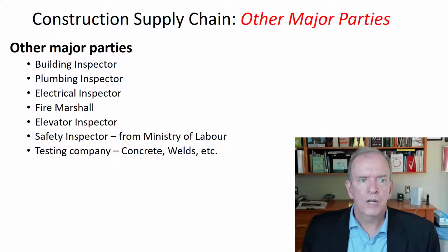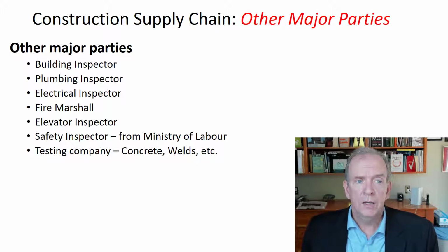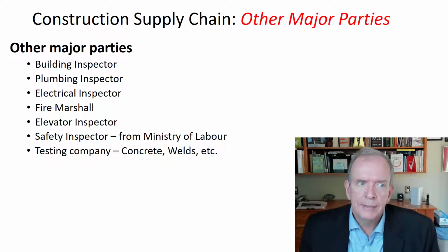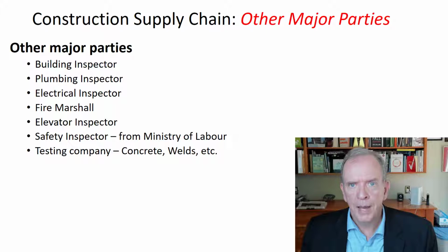So construction supply chain, other major parties that are involved that we didn't mention, all the regulatory authorities, think of that, right? Any of the regulatory authorities can put your project pretty much on stop or hold because you don't have the right approvals either for the permit or to pass an inspection, and things just stop.